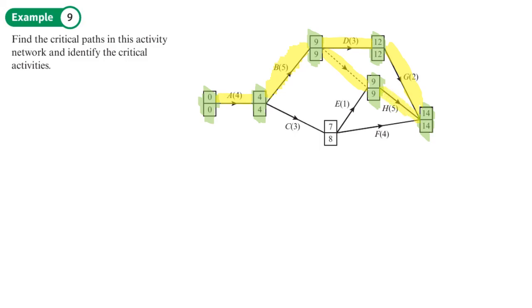So there are actually two critical paths. So the first path goes from A to B to D then to G, and that finishes that route. Or A to B, then from B we've got the dummy that takes us to H. So then that's another critical path.